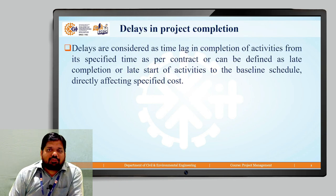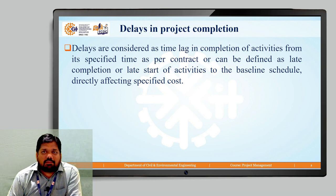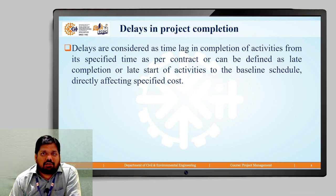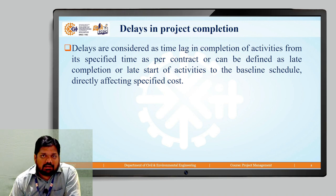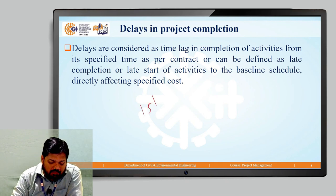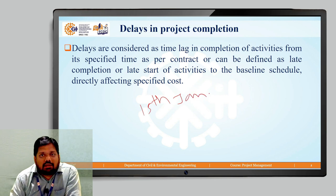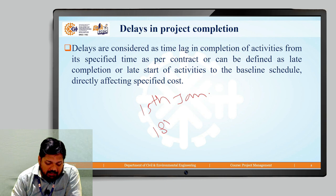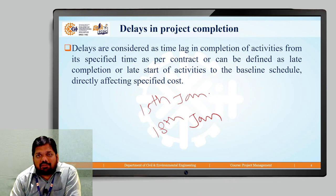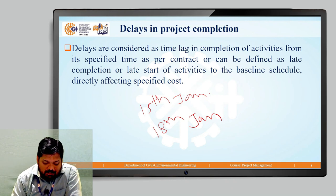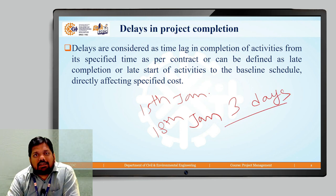So, what is a delay? In general, we know what the meaning of delay is — it is the late completion of a particular activity. Suppose I want to complete a certain task by the 15th of January, and instead of completing it on the 15th of January, I complete the activity on the 18th of January. So that we call a delay of three days.